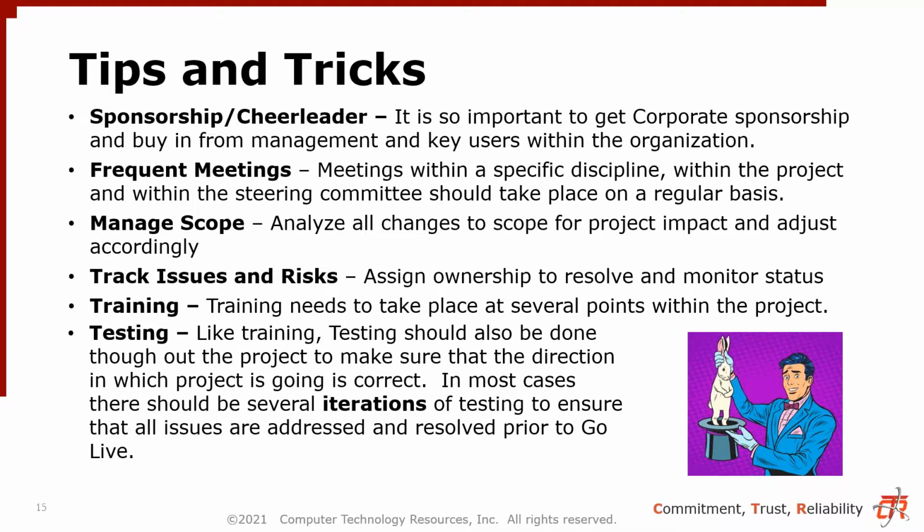Track issues and risks. We always keep an issue log, and those issue logs are monitored throughout the whole process. That's one of the things that an internal project manager and an external project manager meet frequently to make sure. And some of those have to bubble up into Oracle and get resolved. Some of those are bigger issues, some of them are smaller issues. But it's important that you maintain those issues, because you might think you'll remember, but a lot of our projects get into 200, 300, 400 issues. So it's important that they're being tracked.